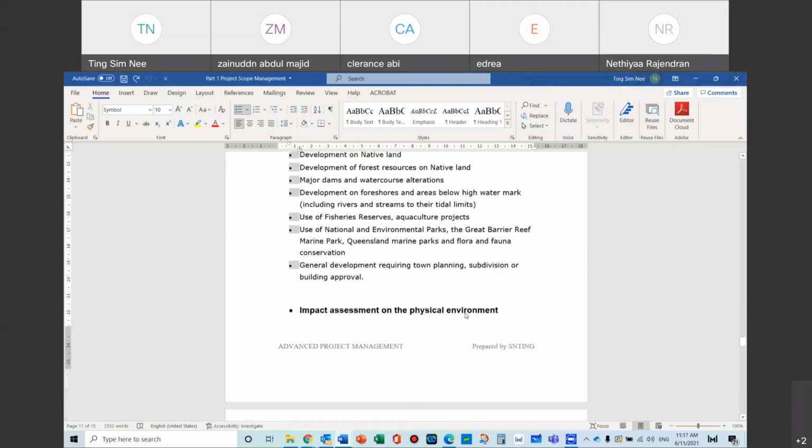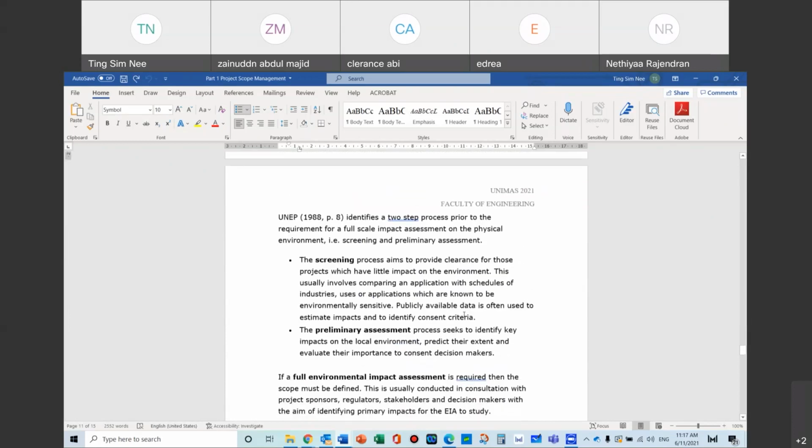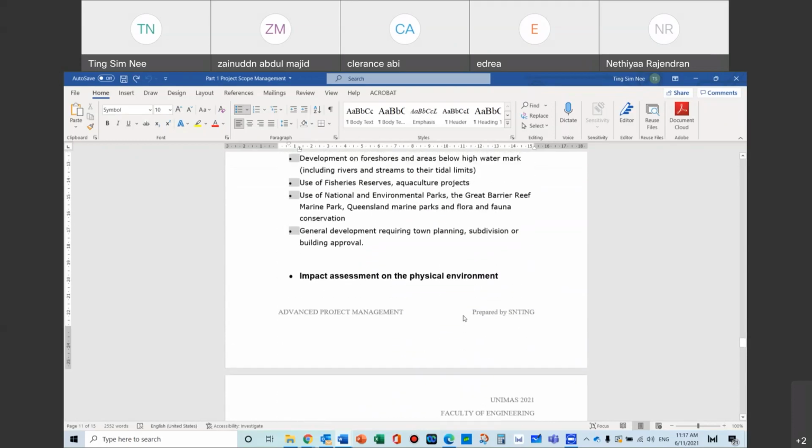So what you really do, like I said, the first step is to draw that chart, put the project in the center, do 3 circles out there, put in all the different issues, and then ask yourself, observe what sort of issues will affect the project, making it not worth it, making it not viable, making it not possible. Possible and viable are 2 different things.